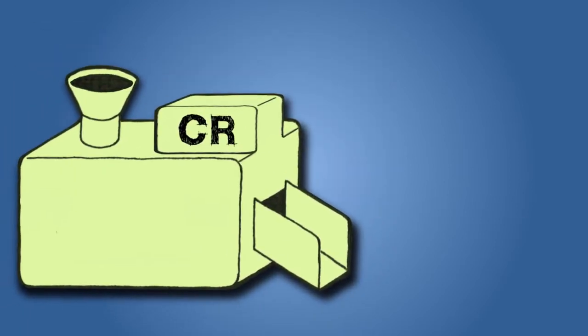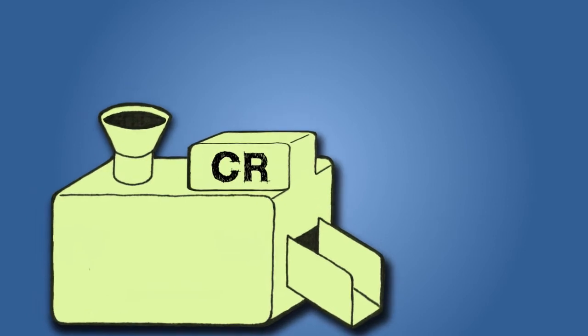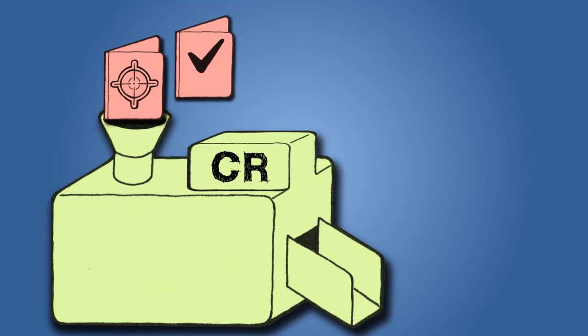The first input into the Collect Requirements process is the Scope Management Plan. The Scope Management Plan helps to provide clarity on the kinds of requirements that need to be collected. The Requirements Management Plan is a subsidiary plan of the Project Management Plan that contains the processes that the project manager will use to collect the requirements.